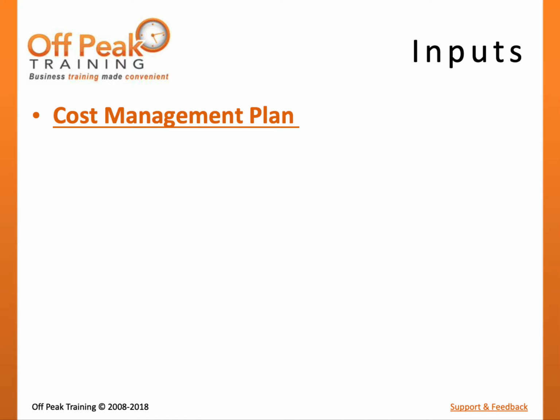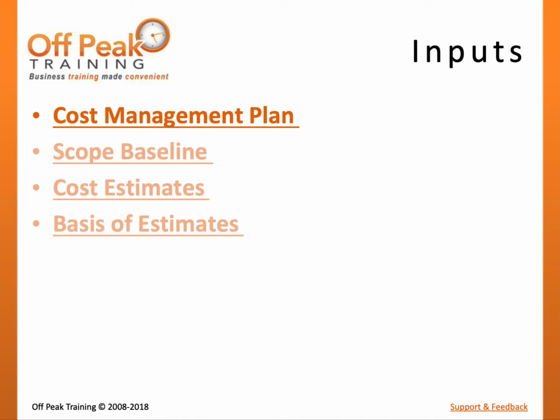Since we will be determining the cost of all of the work, the scope baseline will be an input. More importantly, the key inputs are the cost estimates and the basis of estimates, which together represent the estimated costs attributed to each individual schedule activity, as well as the justification and assumptions behind those estimates.